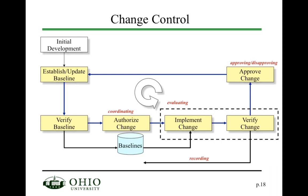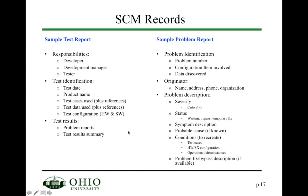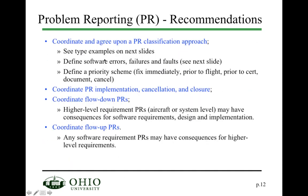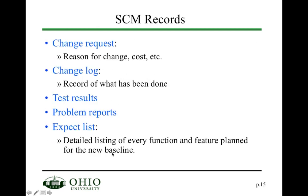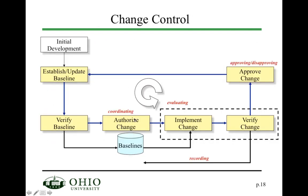Going back to the change control mechanism: starting from the baseline, you verify it, identify problems requiring changes that need to be authorized. You need to perform all the coordination activities discussed, then implement a change and verify it to evaluate that the identified changes are correctly implemented.